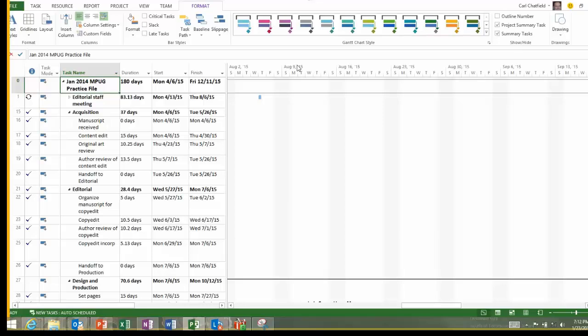One thing I ought to call out is that level 0 is always the name of the file, just a reminder. Whatever you name your project file. Oh, right. That's a good point. So we can see here, my task 0 name is the name of the MPP file, and I can't give it some other name here, which is fine. The duration value, of course, is the overall project duration, the difference between my start date and finish date.